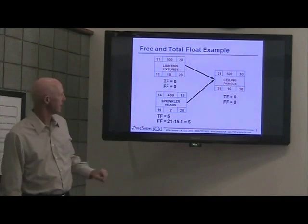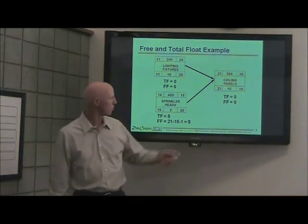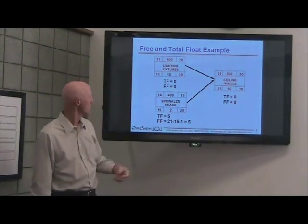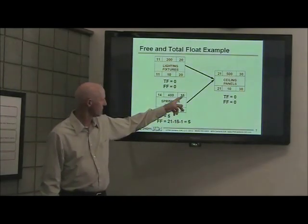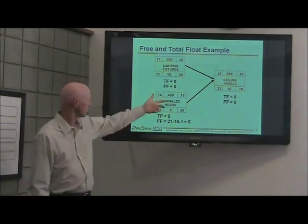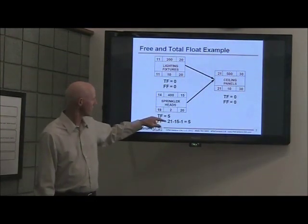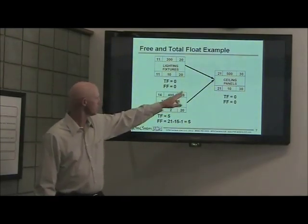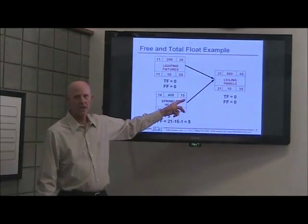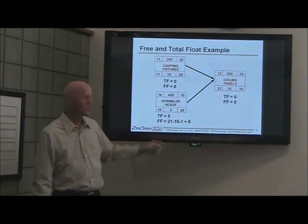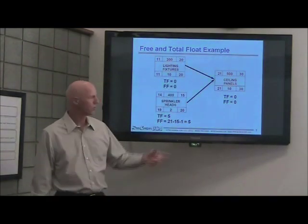Going back to the example — we're not showing the whole schedule, but looking at total float: it's zero here, 30 minus 30, or you could take 21 minus 21. The total float is zero, and it's also zero for the other tasks on that path. For sprinkler heads, it's 20 minus 15 — five days of total float. That means this path can delay up to five days without delaying the completion date. For free float: take 21, the early start of the successor, minus 15, the early finish of the task — that's six, minus one is five. So there are five days of free float for sprinkler heads. For lighting pictures, it's 21 minus 20, which is one, minus one is zero — there is no free float.